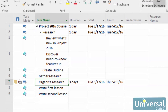The WBS code, or work breakdown structure code, is simply a code that is applied to your outline of tasks that makes different elements of your project easier to identify. These codes are automatically generated so that each task has a unique identity based on the order that it appears in your project. For example, the second task in a second phase of a project has the WBS code 1.2.2. This means that the task belongs to the first phase, is in the second phase, and is the second task.